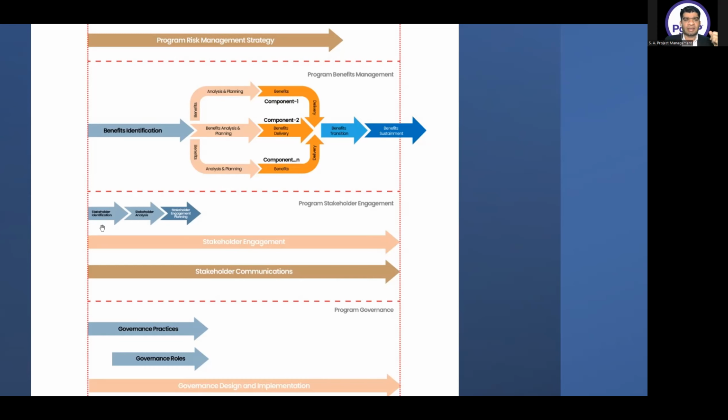So here I will make the stakeholder register, where I will have a list of all the stakeholders, and then I will analyze them. I will do stakeholder analysis. The output of the stakeholder analysis is again the stakeholder register, but an updated one, much more polished, with much more categorization of the stakeholders. In this analysis, we study in detail. We can apply a power interest grid. We can apply a lot of different techniques to categorize the stakeholders and see how they are performing and what their roles are. And then I will do stakeholder engagement planning. The output here will be the stakeholder engagement plan.